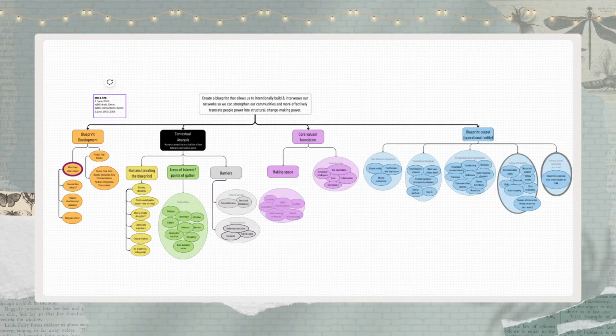We never really finish the final work breakdown structure until after we charter the project, or at least I don't. So I think this is good enough to move into chartering the project, which is why next week we can delve into that.